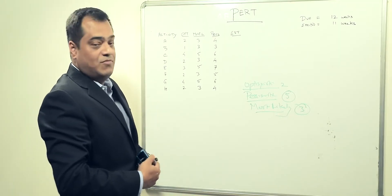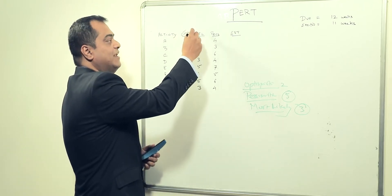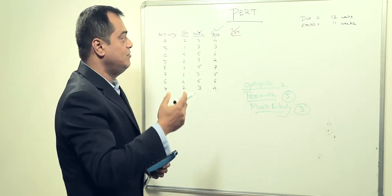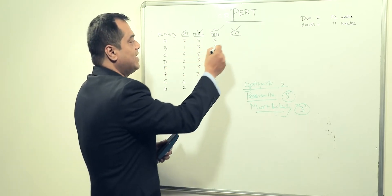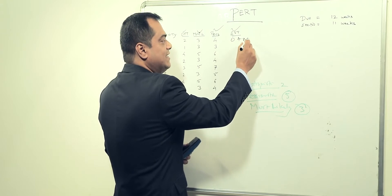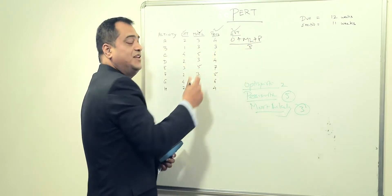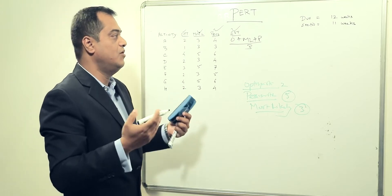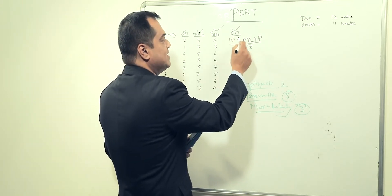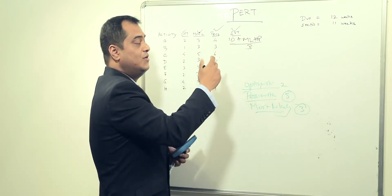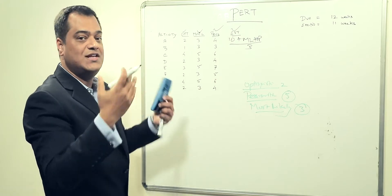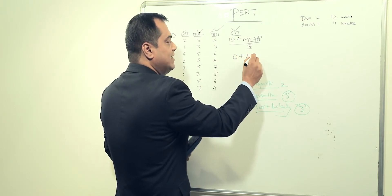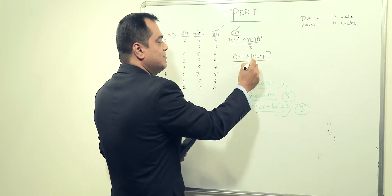To come up with an estimated time, we take the optimistic, most likely, and pessimistic values. Normally we'd divide by three, but in PERT the formula weights most likely more heavily. The formula is: optimistic plus four times most likely plus pessimistic, all divided by six. Most likely is doubled up because that's what's most likely to happen.